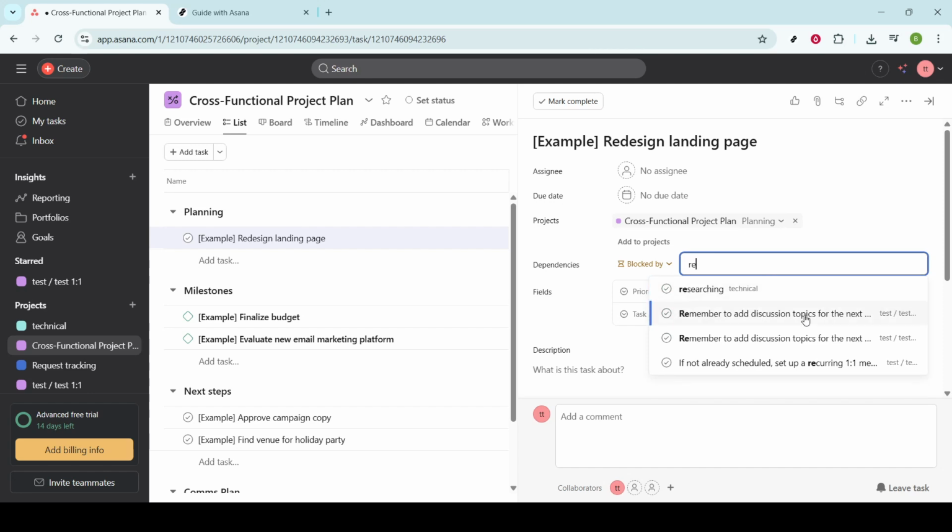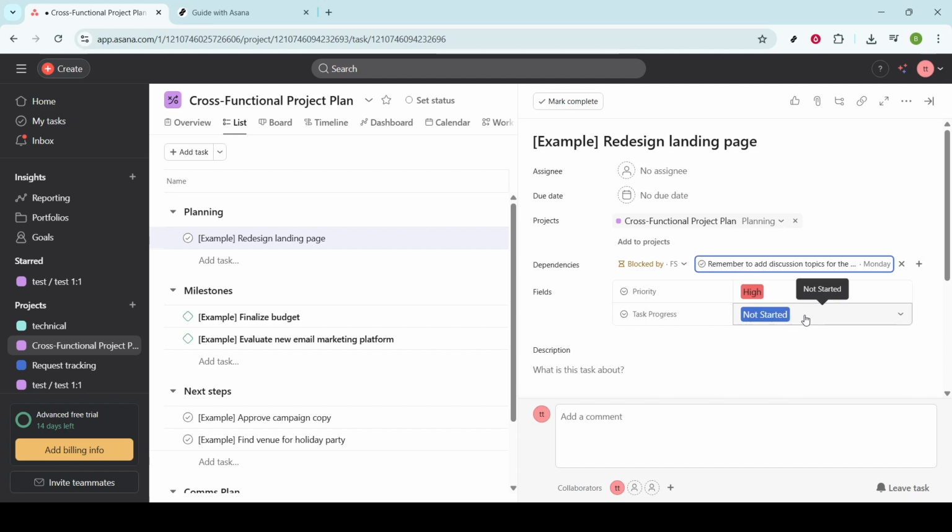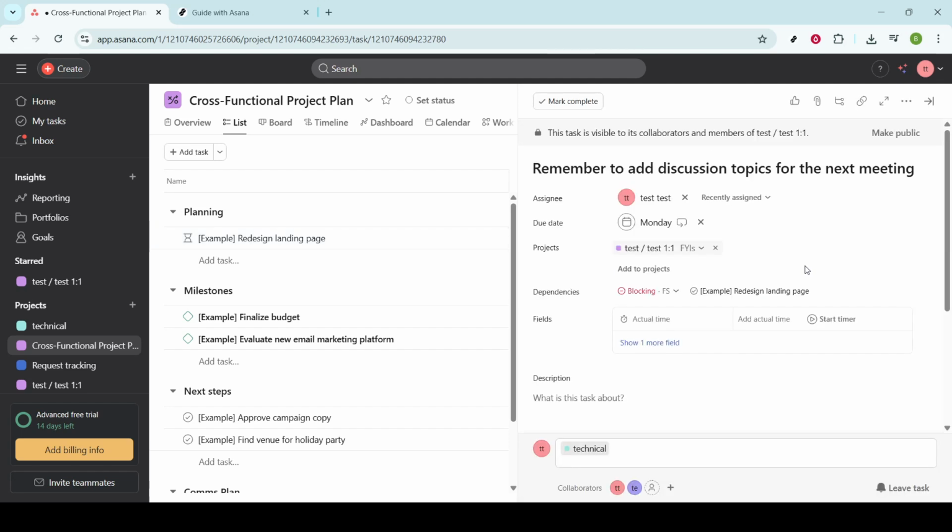As you begin typing the task name, you'll see a drop-down list appear. This list provides you with suggestions based on the tasks within your current project. Carefully scroll through these suggestions, locate the task that you need to establish as a prerequisite, and select it. Thoughtful selection is important because the proper task order plays a pivotal role in the smooth progression of your project. Once you've found the right task and made your selection from the drop-down menu, consider this task complete.